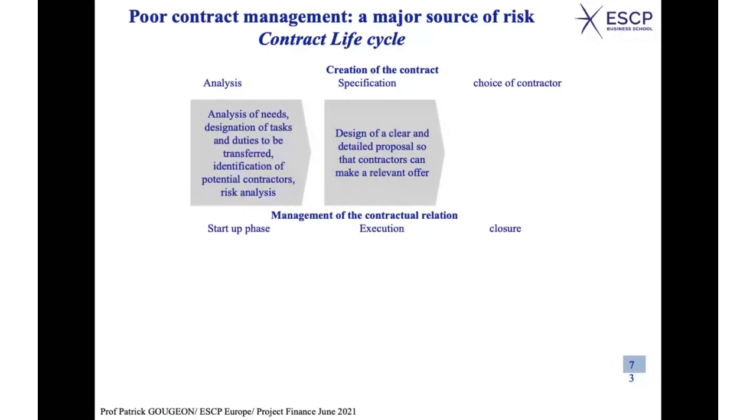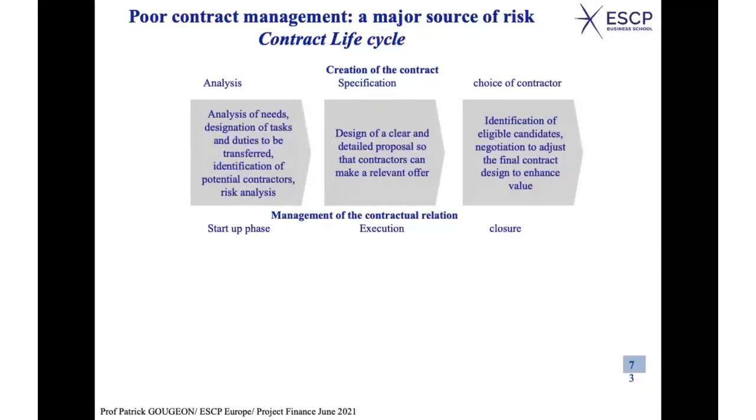You have a specification. It has been sent to all types of potential companies that could provide the service. You have to choose. Who is going to choose that? Well, usually you have specific personnel, those who are responsible for purchases, who are going to be involved. So you see another group of people will come in. And normally, those who have made the analysis in the first place are very much concerned, so they should contribute to the decision. They do contribute, but not alone.